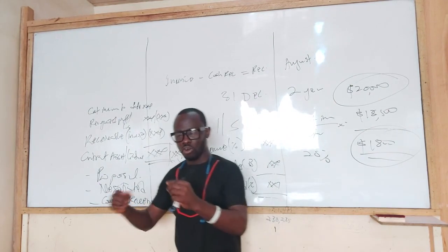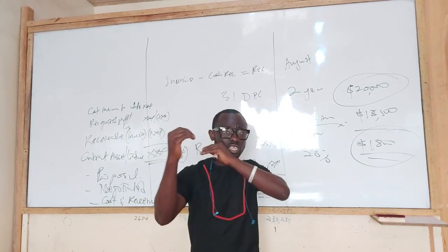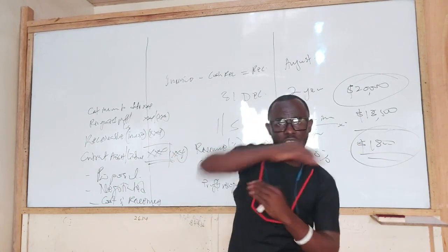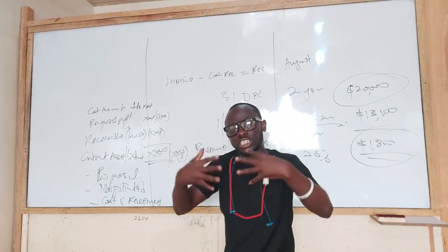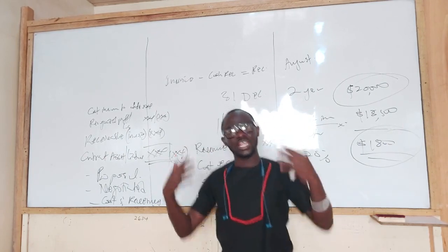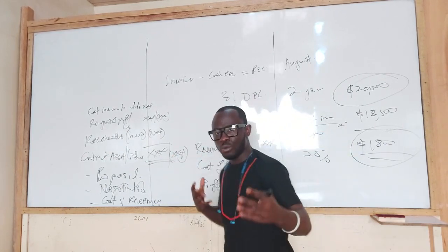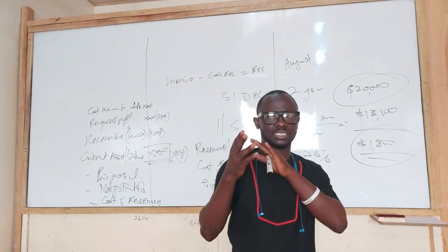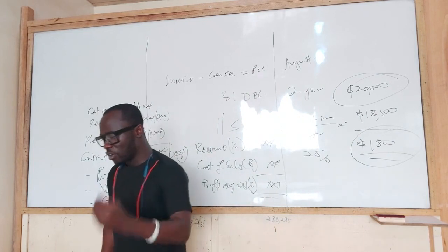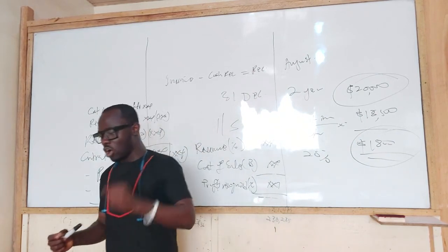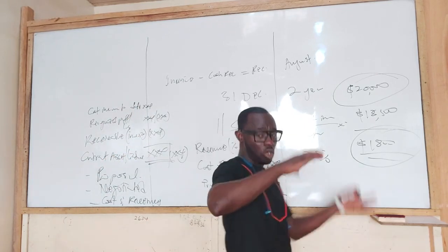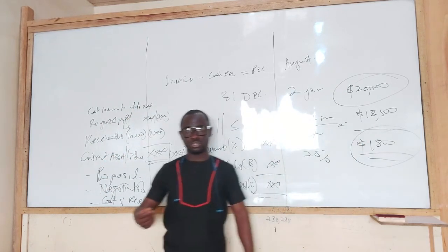Or we are constructing a road in a town or in a city where it's going to be busy all day. So we need to construct a footbridge. So, because these things are necessary, interrelated, and cannot be done without the construction of the road, that is going to be in it. In that case, we will treat the two activities as a single contract. Then number three, the contracts are performed concurrently or in a continuous sequence.